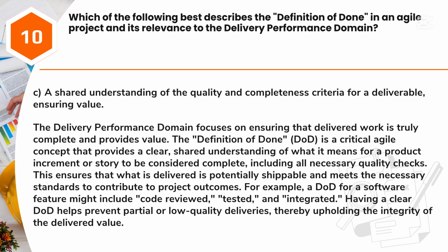This ensures that what is delivered is potentially shippable and meets the necessary standards to contribute to project outcomes. For example, a DoD for a software feature might include code reviewed, tested, and integrated. Having a clear DoD helps prevent partial or low-quality deliveries, thereby upholding the integrity of the delivered value.